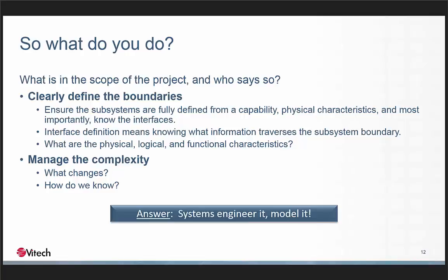Because this thing is a critical system for self-protection on a ship. It has to be able to detect early, provide the information over to the command and control so that targeting solutions can be developed, and that it can also take out the hostile elements. We can't sacrifice that. We need to know how it works today, because one of the estimates is that it may be tens of millions of dollars to develop a radar, but it could be hundreds of millions of dollars to integrate that system throughout the entire platform, the cruiser, destroyer, or amphib. So there's a real serious consideration of how does that work.